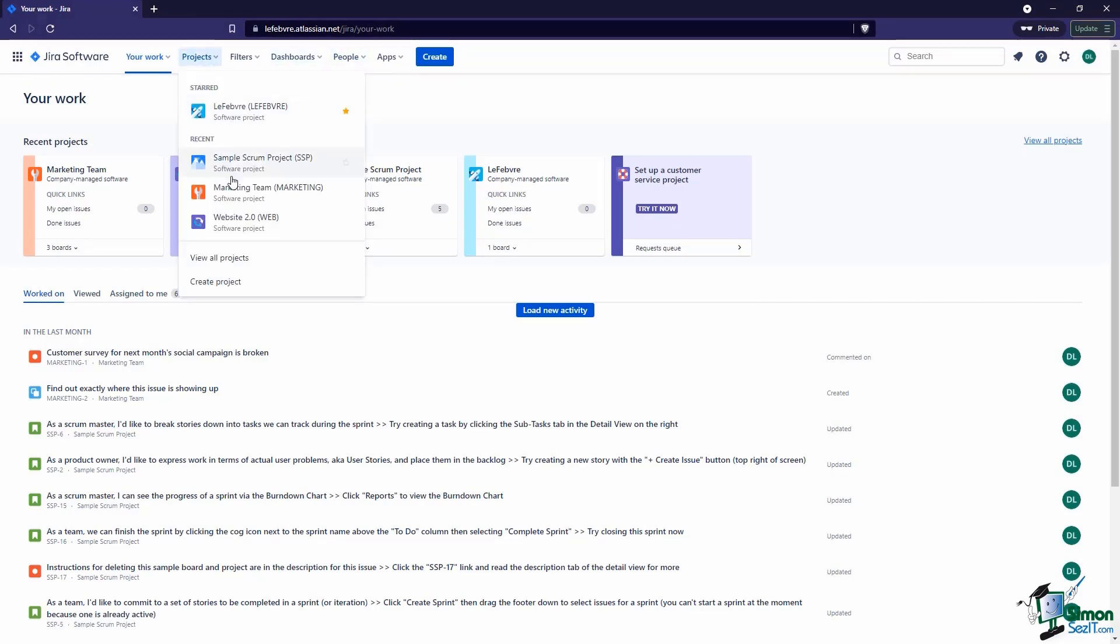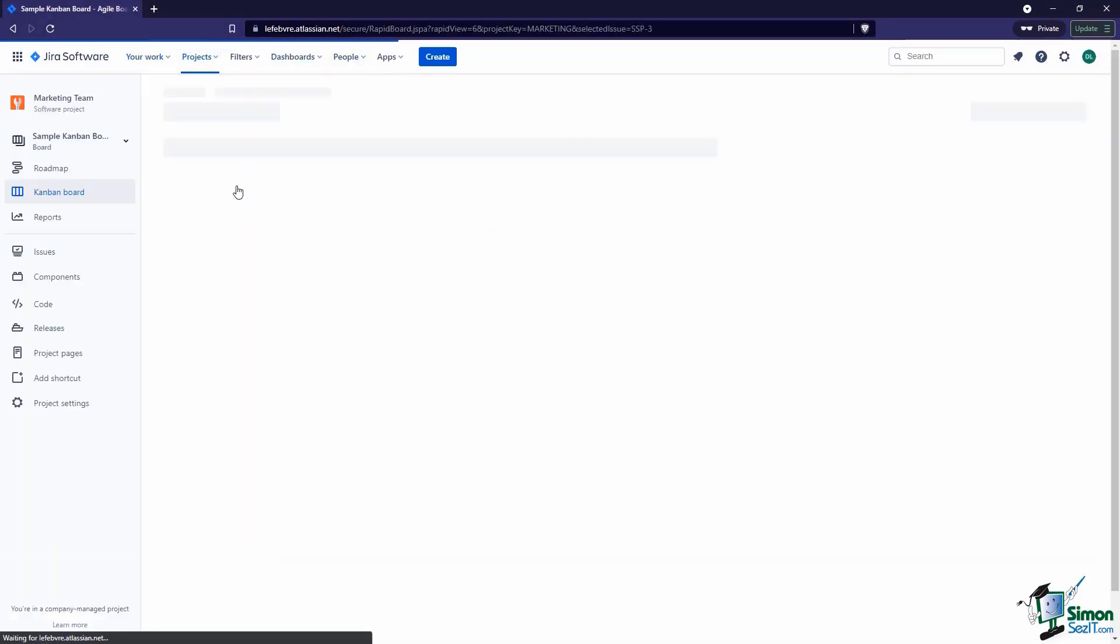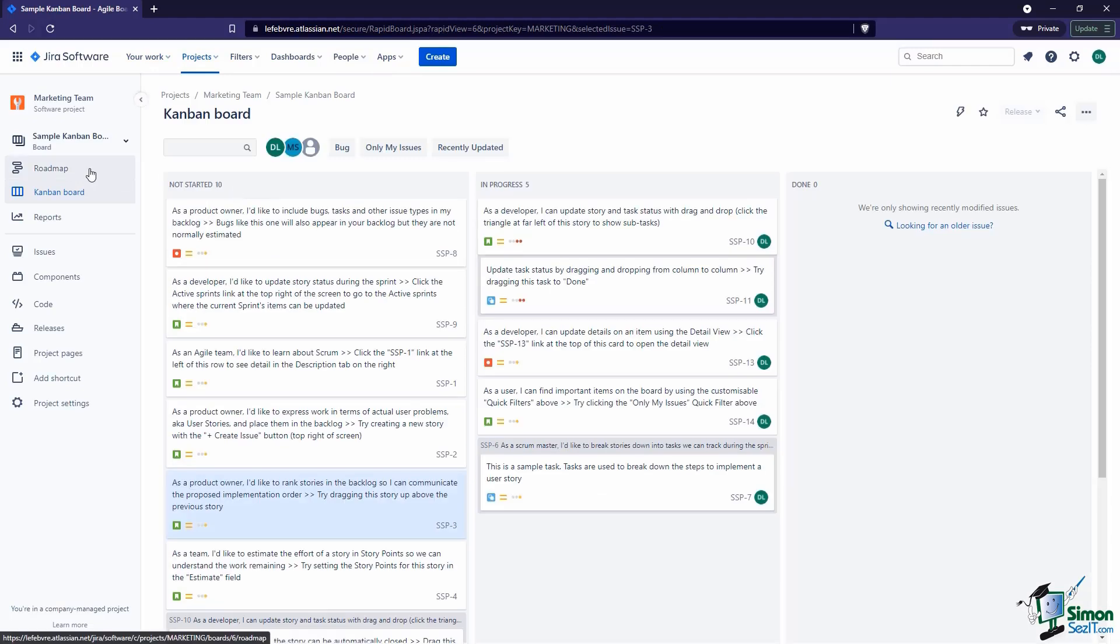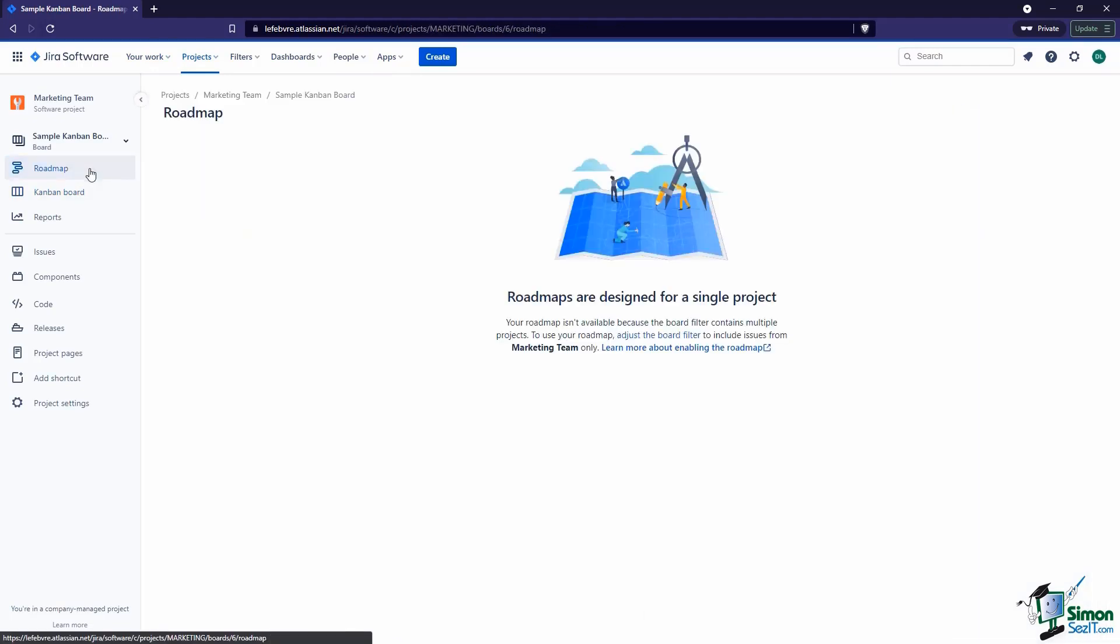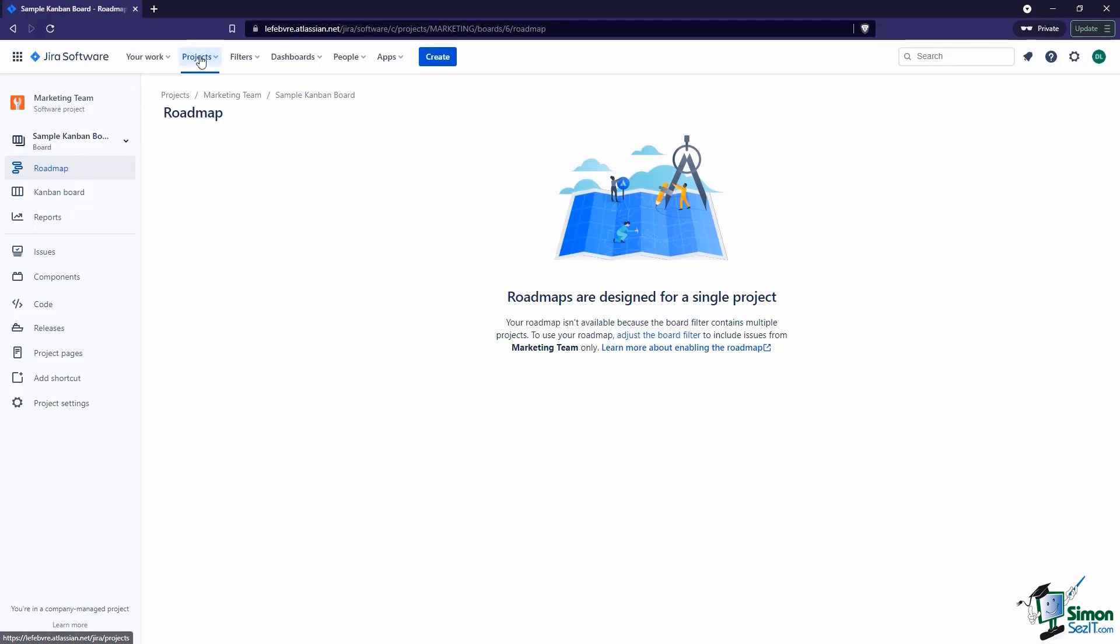Let's come up to Roadmap, and we're going to see an error. The reason for this is because we are in the Marketing Team project, but when we set up our board, we're actually pulling in issues from a different project. So that's the first thing to know about Roadmaps: they only work in the same project where your issues live.